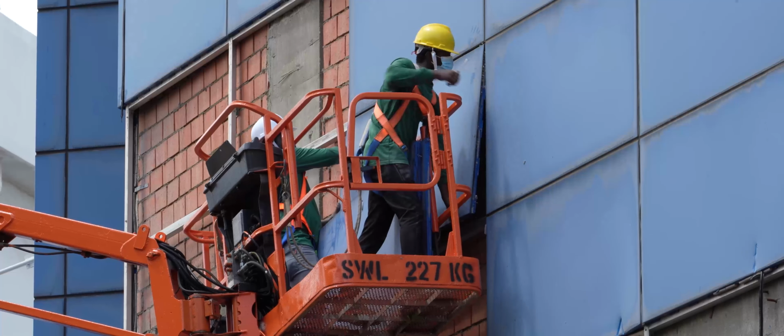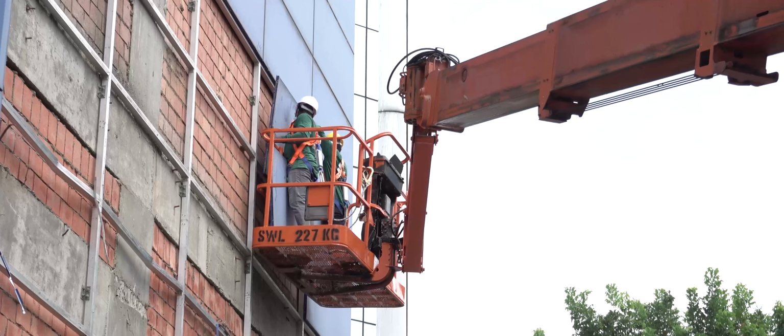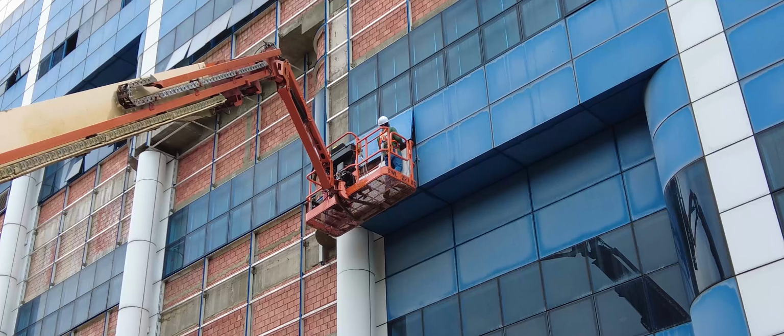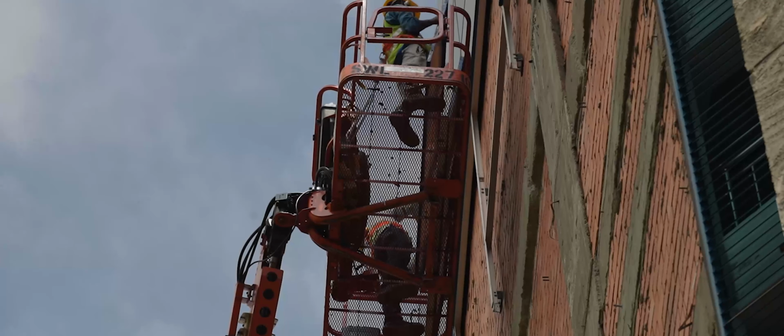So once we confirmed the main contractor, works were supposed to start around April or March, but the ramp up was really quite slow. And that was partially because of the lack of available workers overall. Although we were approaching the end of COVID, and people were allowed to return to work, there were a lot of restrictions in terms of group sizes.